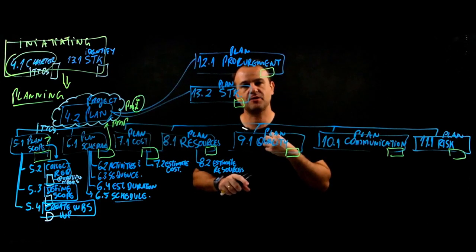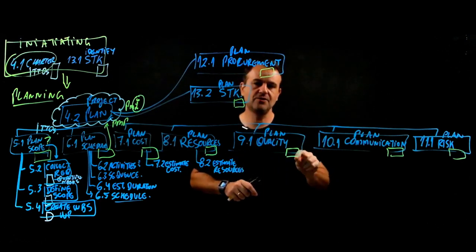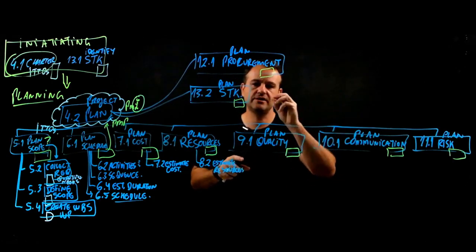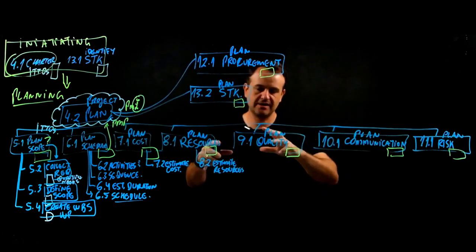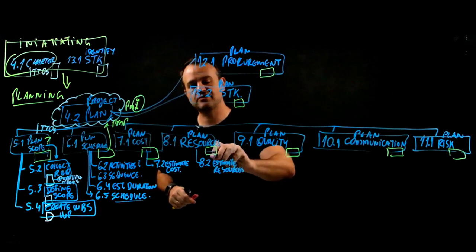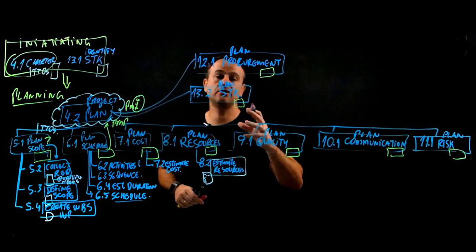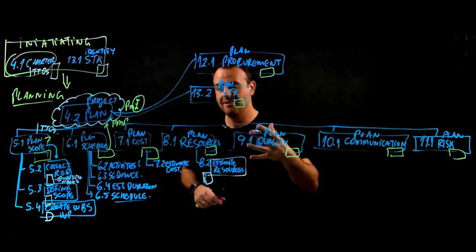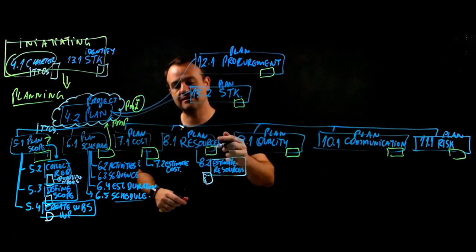So what I did as project manager with the estimate resources is that I went through all the tasks. And in the tasks, I explained it. I need one engineer, 2 technicians, 1 mechanical engineer, 10 computers, I need this, this, and that. And in the end, what we have here in the estimate resources is a resource list.